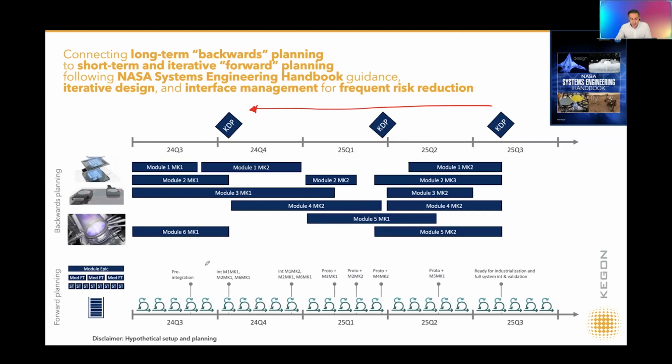And on top of that, we also have forward-looking planning, which we do in extreme detail, typically over 2 weeks. We know that from Scrum, a 2-week iteration, and for instance, on a quarterly basis. So on a 2-weekly basis, we're looking at whether we have any delays. If we have any delay, we see a milestone approaching in the distance, but we have less and less time.